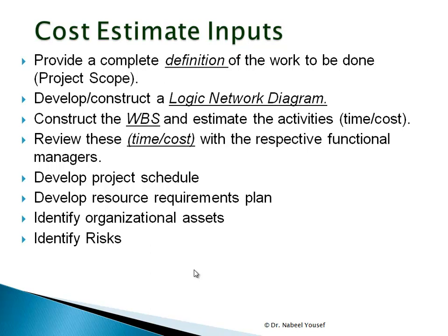We need to develop and construct the logic network diagram, which we learned in the previous session. And then we need to construct the work breakdown structure and estimate the different activities' time, and of course, we start adding the cost as we go, and review the time and cost with the respective functional manager. Sometimes we review it with the customer to make sure that we are on the right track.